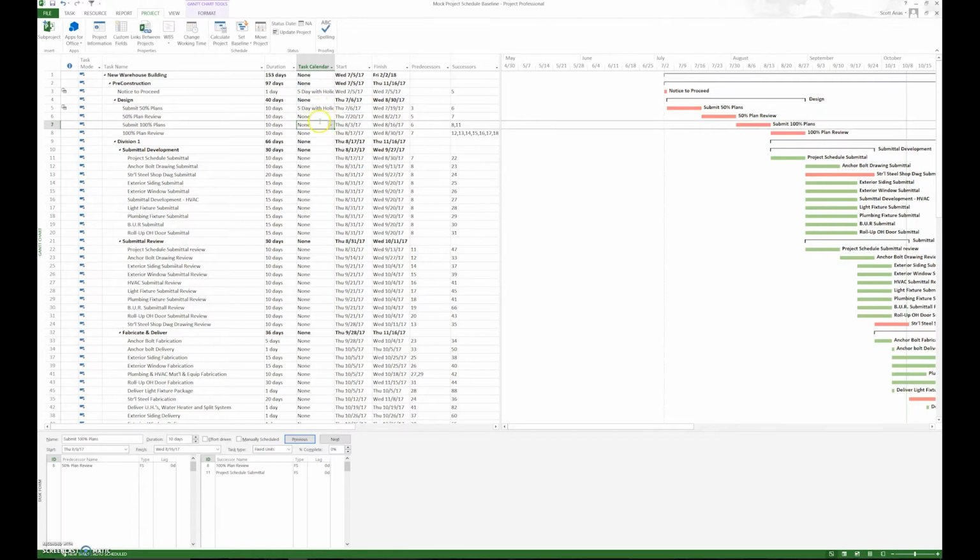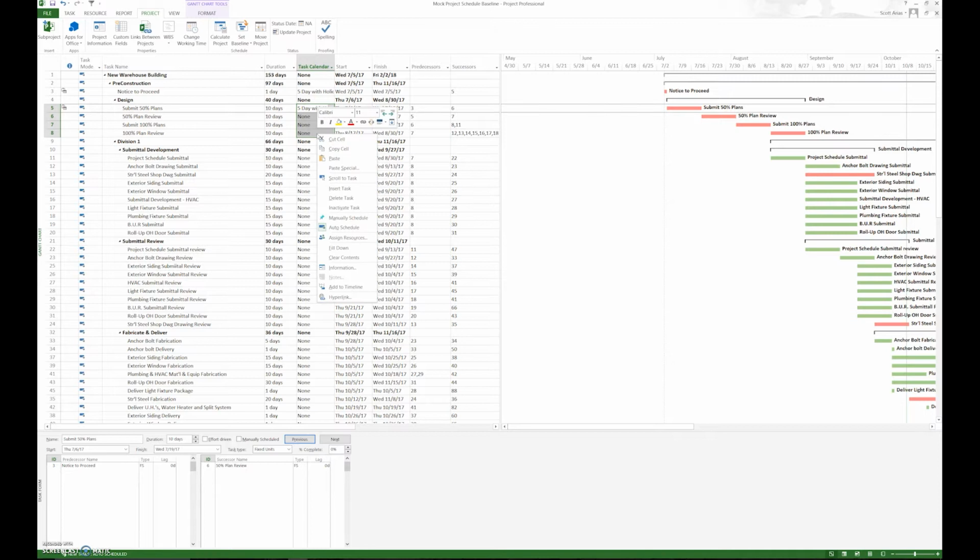we can simply select one, hold down the shift key, select the last one, and that chooses all the individual activities. Right click and fill down. And what that does is basically just copies and pastes. It fills all the way down and assigns the correct calendar. And that way you can relatively quickly go through and assign calendars.